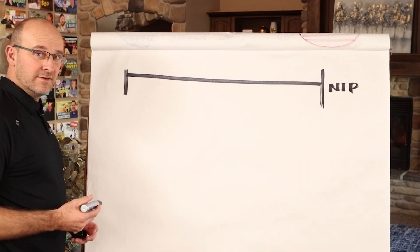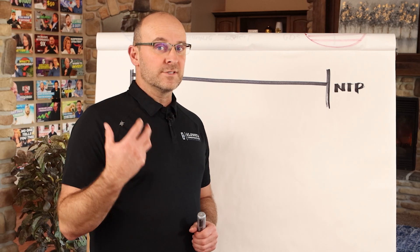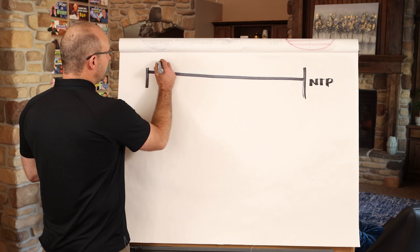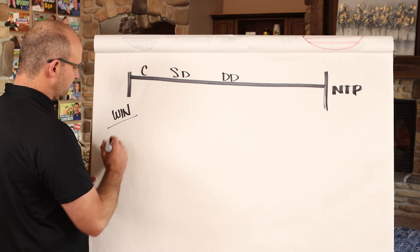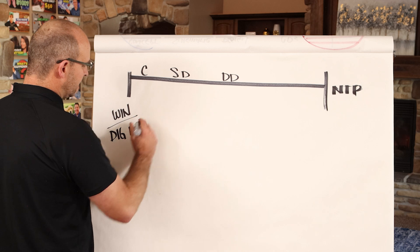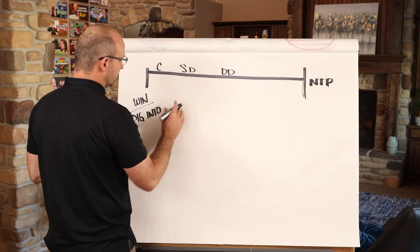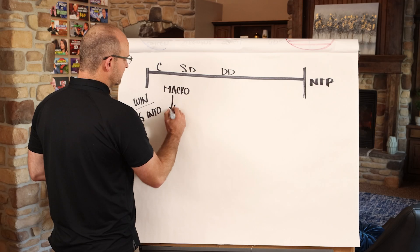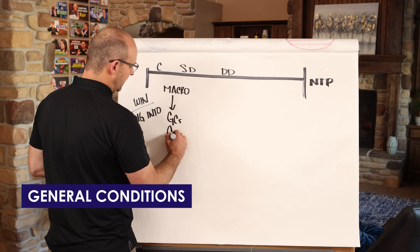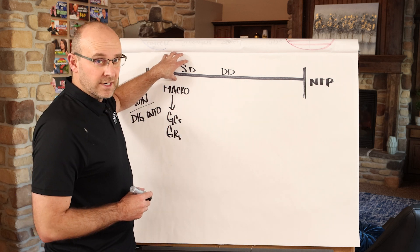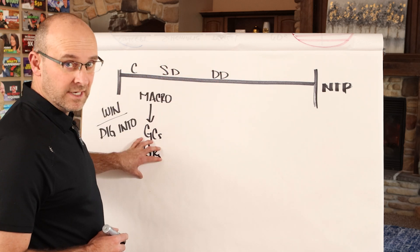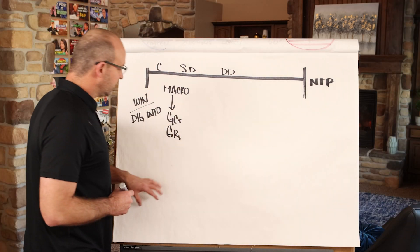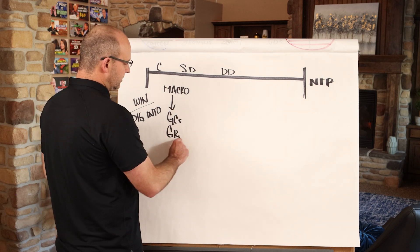Throughout the pre-construction timeline you have high-level focuses. When you're in the concept design and schematic design phase — before design development — not only are you working to win the job, but you should dig into the project and find key things. What we really want to do in this phase is come up with a macro-level attack plan to make sure that your general conditions and general requirements are estimated. You don't want to underestimate these, so that designers think they can keep adding scope without accounting for the money needed to manage the project.